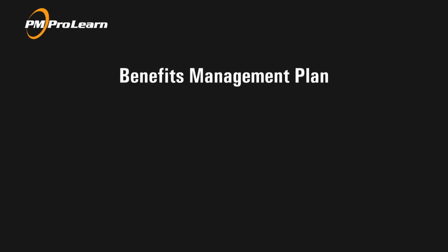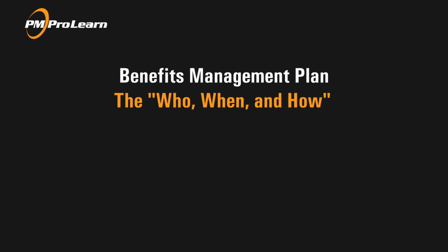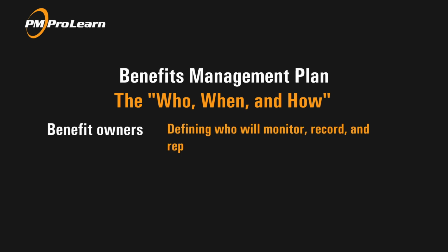Secondly, the benefits management plan. The benefits management plan is used to understand the who, when, and how the net positive outcomes will be obtained and understood. Oftentimes, the targets for who we want to benefit from the project are more complicated than just customer and seller interactions. So understanding all of the various stakeholders like potential suppliers, partners, and even internal teams helps us to refine our attention. The benefits management plan includes not only who will benefit, but who is responsible for realizing